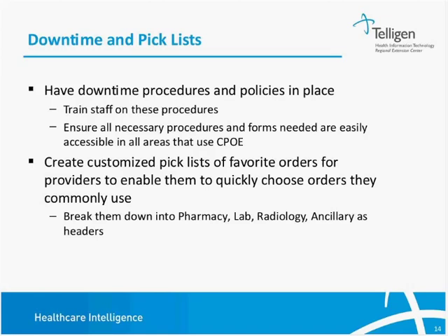And really, truly, you should not wait until the system goes down to try out this downtime procedure. Have the equivalent of a mock fire drill, only with downtime procedures, and let them use that so that they feel comfortable and it's not during an urgent time where things may be crazy and they don't know what to do. So you can plan it at an ideal time and let them go through that fire drill process of downtime procedures and ensure that they're comfortable with it when you do actually need to use it.